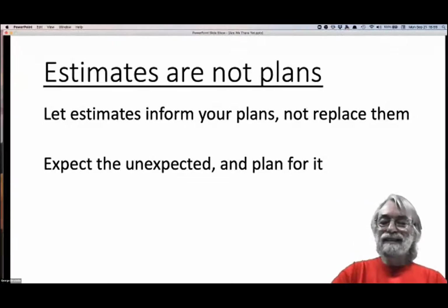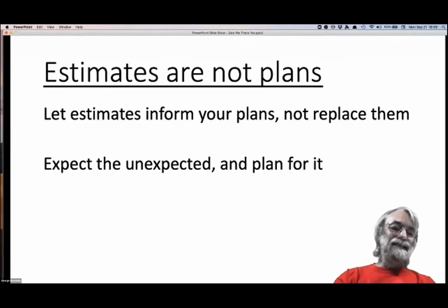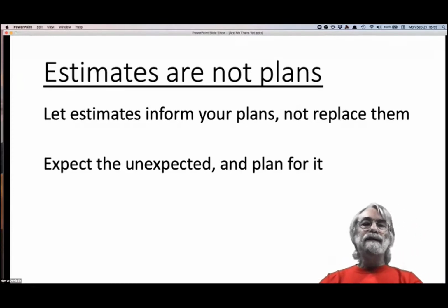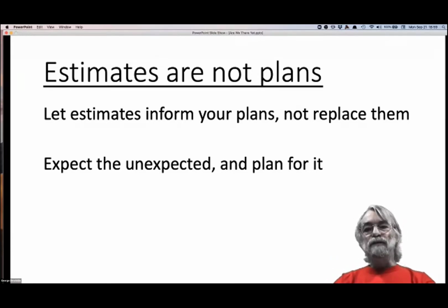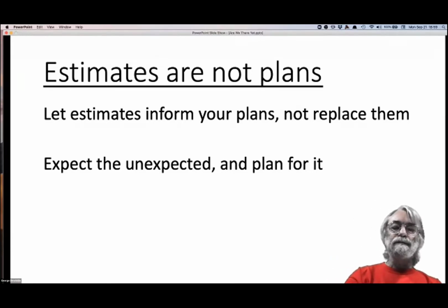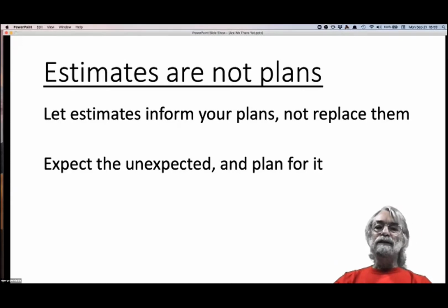Well, you really need to keep those separate. Maybe when you give the estimate, you also give some plans to go along with it. Okay, we estimate it's going to take this long, but we also need this much contingency planning and buffer for the things that we don't know about.